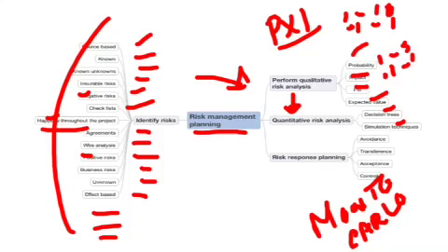Then whatever is shortlisted after this qualitative risk analysis and quantitative risk analysis, risk response planning happens against them. Primarily we are going to talk about what are the things we should be doing to reduce the probability or to reduce the impact or to reduce both, so that P into I will be lesser. The expected value or the expected monetary value of the risk can be reduced.